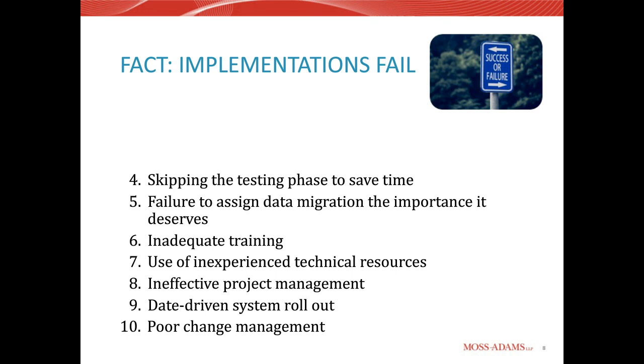Have each user test their functional areas as the system is intended to be used, and document the test results. Any issues should be immediately reported on the issue list for quick resolution. And you want to conduct all of these tests in a sandbox, which is an exact backup copy of your production database. And my advice is never to go live until you have resolved all issues that you prioritize as critical on that issue list.